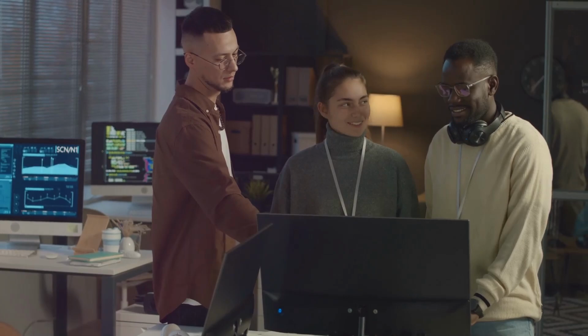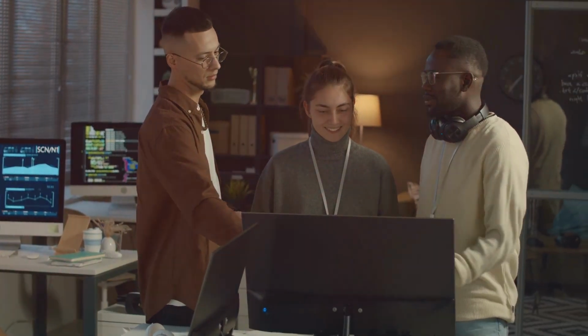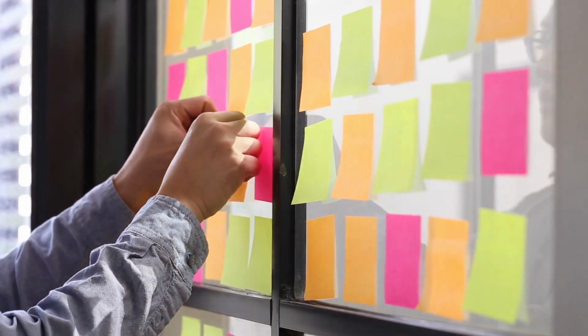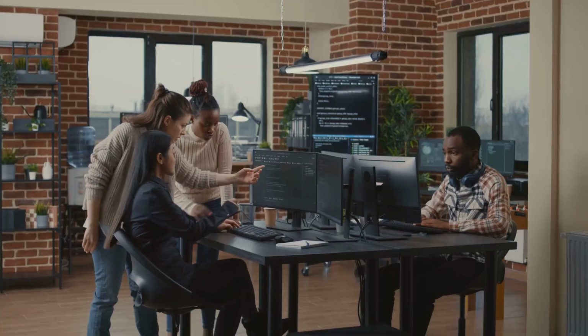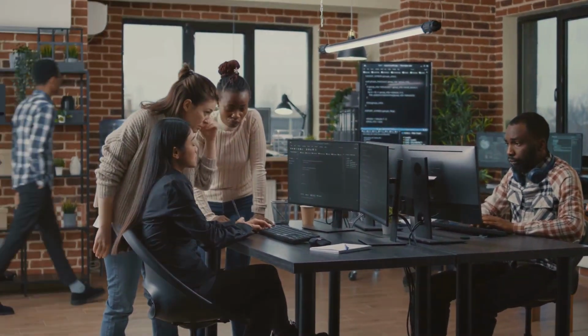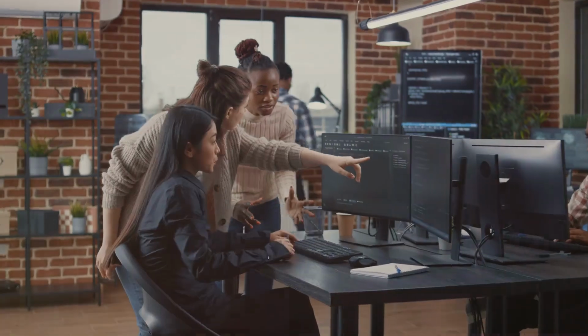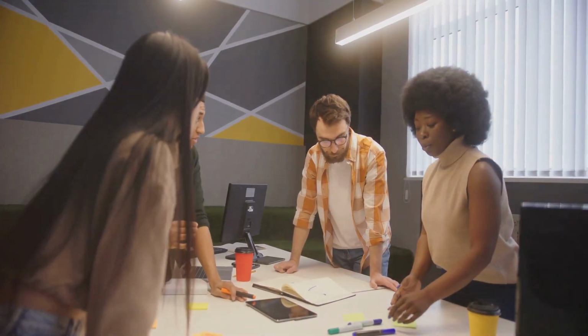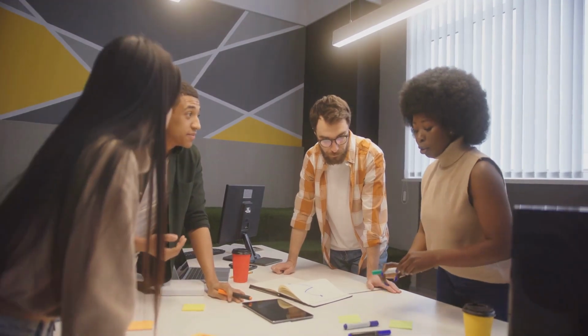Lastly, let's explore Crystal Clear, a lightweight approach for small teams. Crystal Clear is the simplest and most lightweight methodology within the Crystal family. It is well suited for small teams of up to 6 people working on non-critical projects. Crystal Clear emphasizes direct communication, co-location, and frequent delivery of working software.